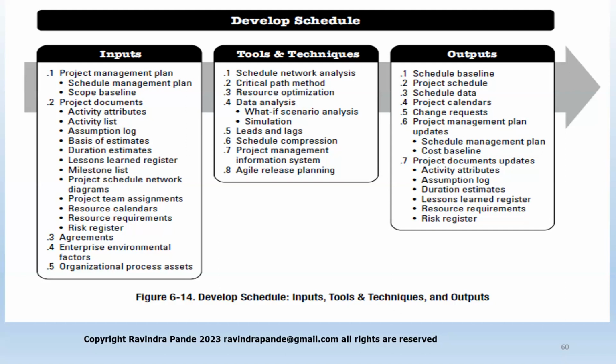Then we have a project calendar. Like the resource calendar, we have an organizational calendar called the project calendar. This talks about the organizational holidays. Like Christmas is a holiday in North America. There is a standard eight holidays policy in a year. And that's basically included in these project calendars as well, so that we don't plan working on holidays.